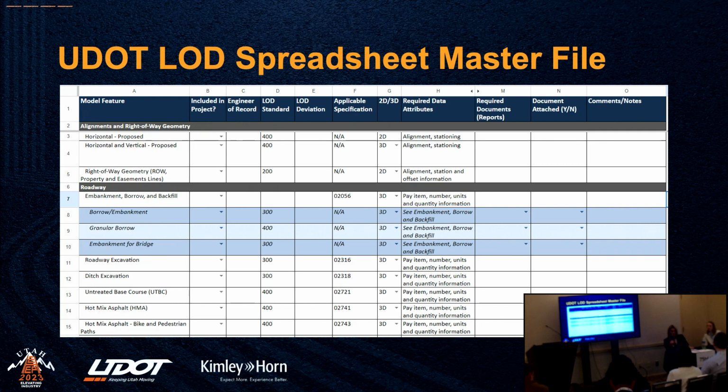From that standpoint, yes, it's going to be a little bit more expensive for us, but the return on investment is that you then have fewer change orders in the field because we've designed it a lot better. It's going to be a shift. You're going to put a little bit more money up front, and you're going to save money on the back end, because pre-construction is a fraction of the construction cost. That's just my opinion.